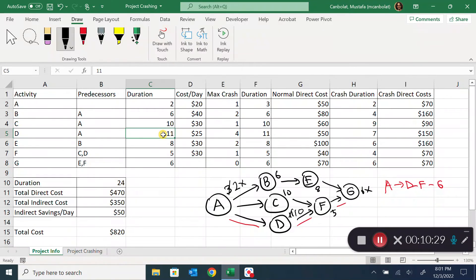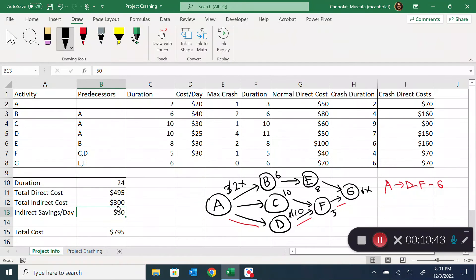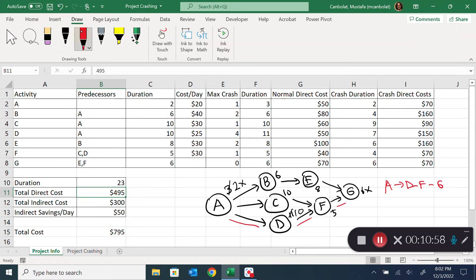Reducing D to duration 10, I pay another 25 dollars, so direct cost goes up to 495. Indirect cost goes down to 300 — the indirect savings per day is 50 dollars. Total cost is now 795 dollars for 23 days of duration. But now I realize that path A-D-F-G is 23, and path A-C-F-G is also 23, so A-C-F-G has also become a critical path.